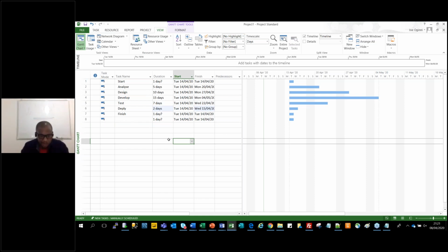The next thing then we need to begin to think of. At this moment, we've set up a task on auto schedule. You can see that. The assumption is, because we already set, don't forget, at the beginning, we set our starting date to the 13th. So it assumes we're starting on the 13th. You can see that, 13th April. And it's assuming everything is starting on the same date. But are they starting on the same date? No. It's not going to be the same day starting. Yes, there's going to be a lot of dependencies under a starting date.